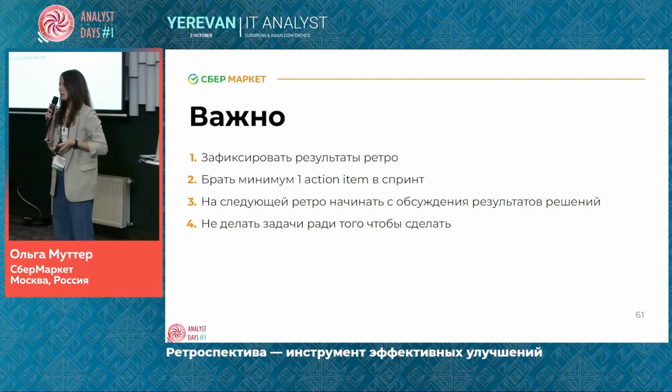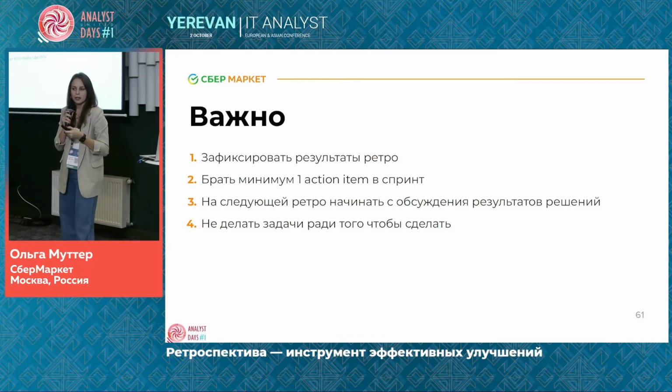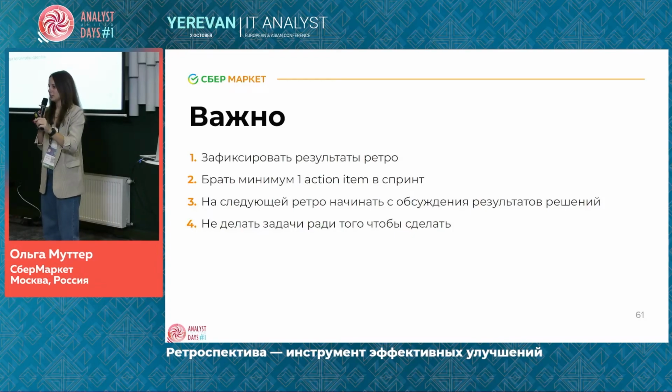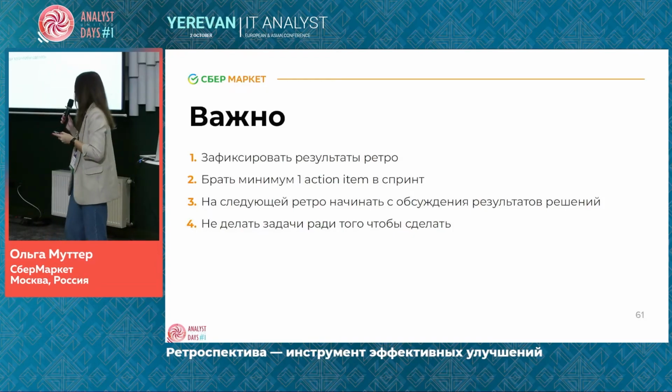The results of the retrospective should be documented. It should be a single page with all the results of retrospectives. You take one action item in the sprint, the decisions that you made, you need to implement it.